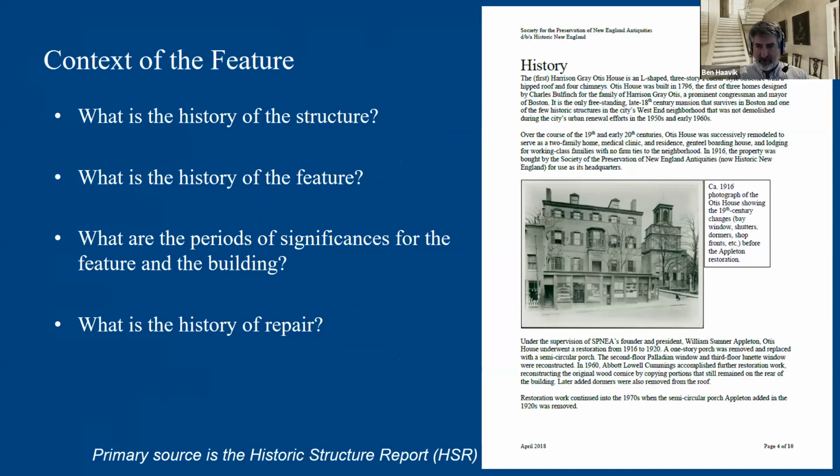You would pull that from your historic structures reports. I'll be totally honest, we don't have historic structures reports for all of our buildings. But if we do a project, we basically write mini historic structures reports. My project managers have to do the research to figure out what was going on historically, what is important, and how we define the repair around the context of history.